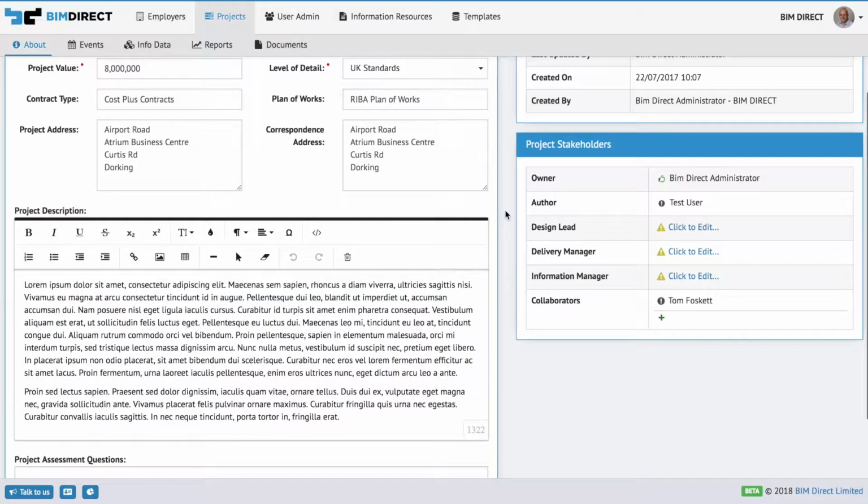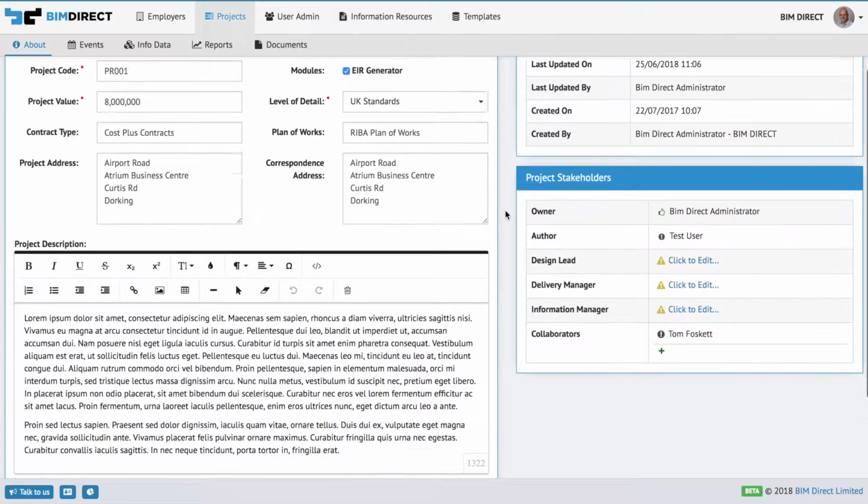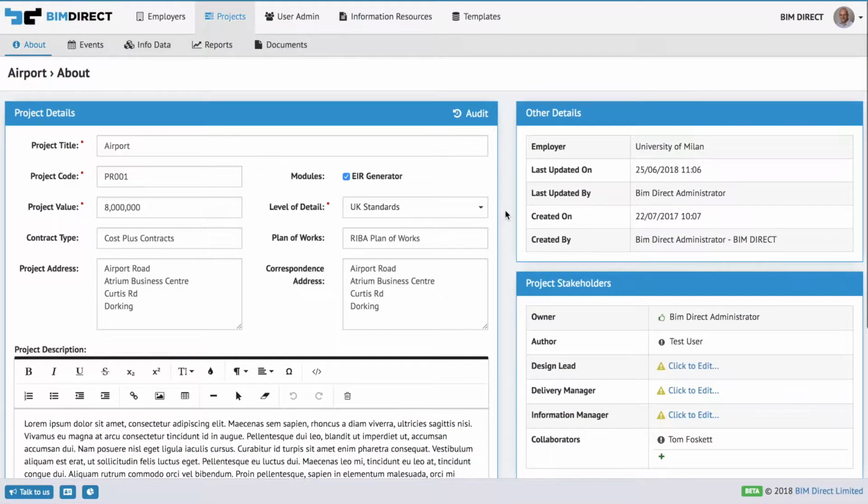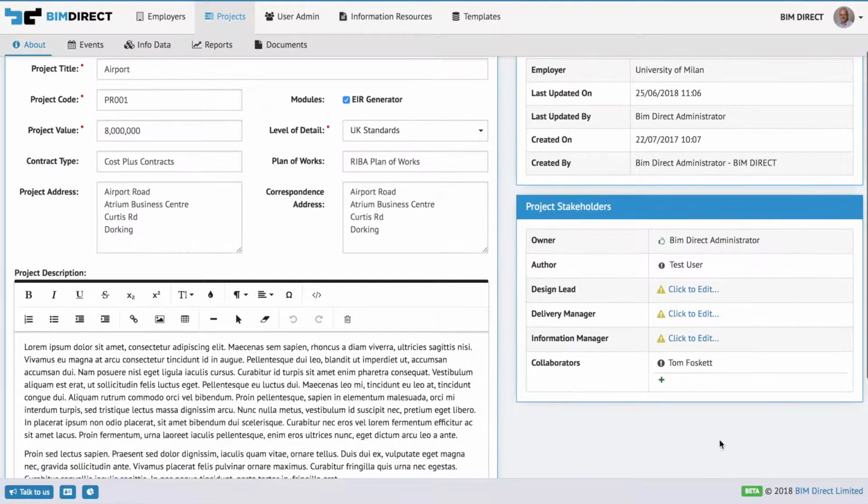So what you have to do is involve a glass manufacturer, even though you don't know yet who is going to provide the glass. You have to have someone alongside you to provide some input and advice, so that you then write the project scope correctly and you get the best outcome out of it. So alright, once you have created the list of stakeholders and assigned them all in this panel,